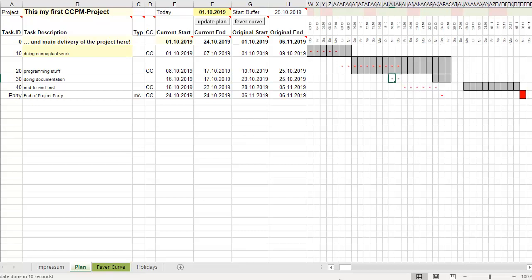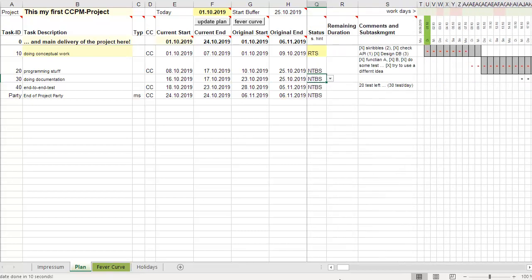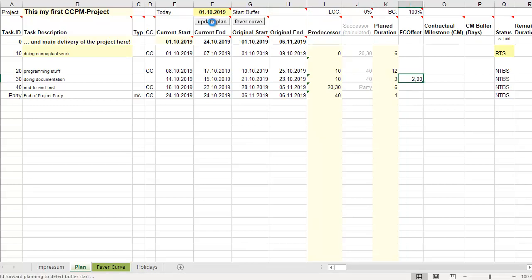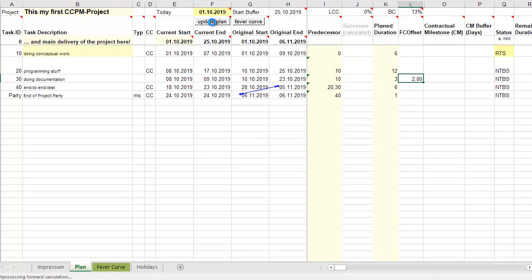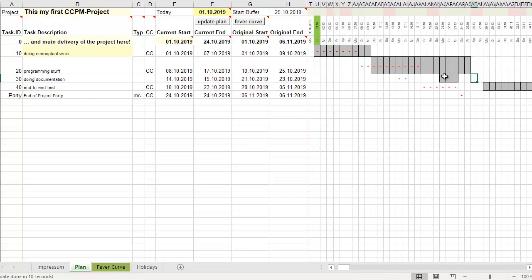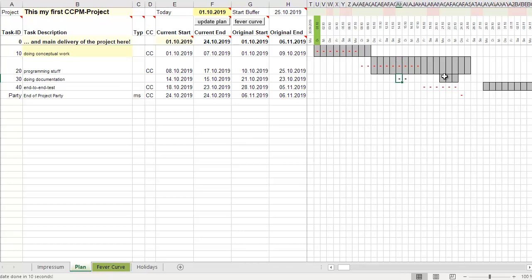I said something about the feeding chain. This is here the feeding chain. Now you can manually add a feeding chain offset, maybe two days or something like that. You can update the plan, and then the Excel will move this a little forward in time, and you have some additional buffer. In the plan you see now two days. If this work package is delayed by two days, the critical chain will still be intact. It's not very necessary to do this because typically in the longer work packages something occurs, delays occur. The shorter feeding chains typically have no so much problems as the critical chain.